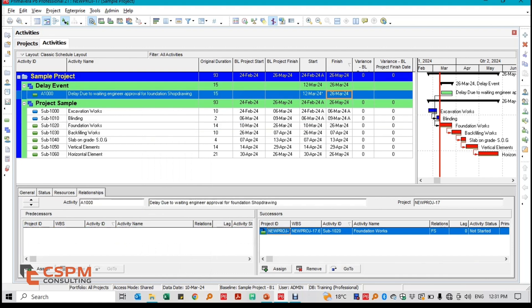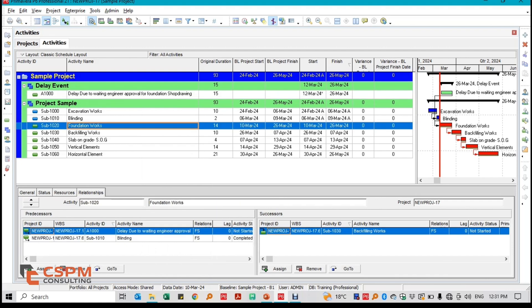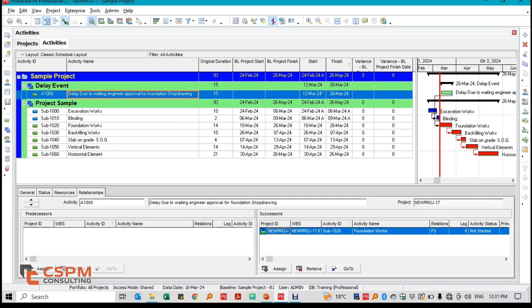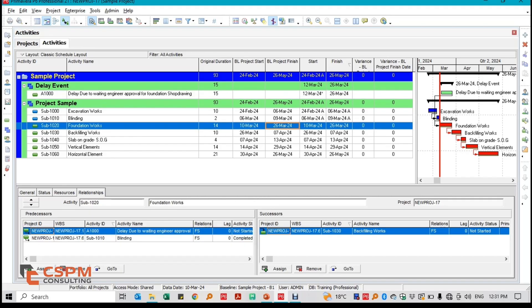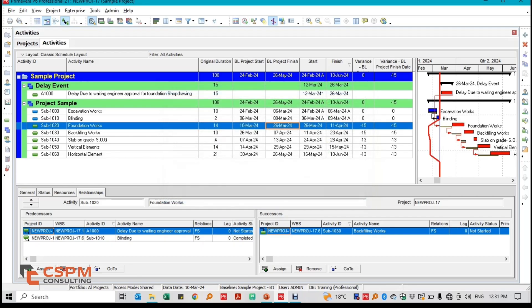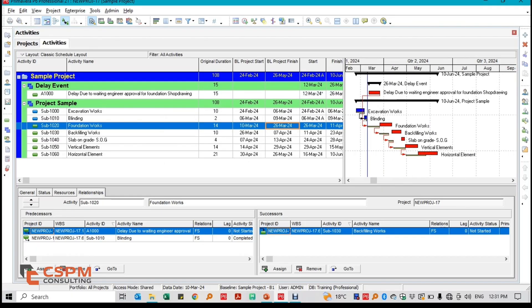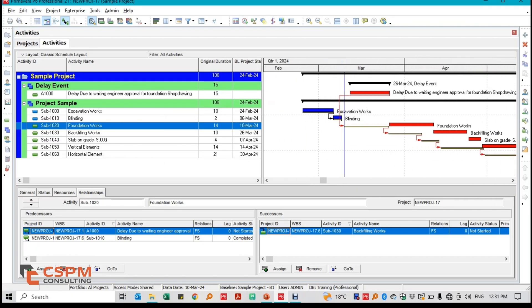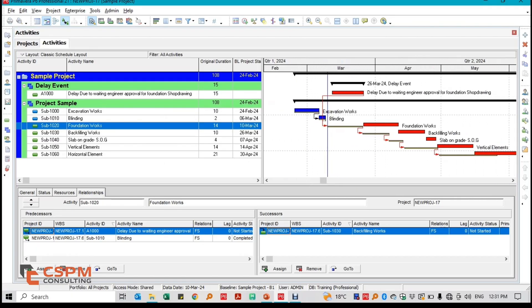As you can see on the Gantt chart, the original planned completion date was on the 26th of May 2024. After updating the schedule, the new projected completion date shifts to the 10th of June 2024, accounting for the delay and revealing a 15-day extension due to the approval delay.